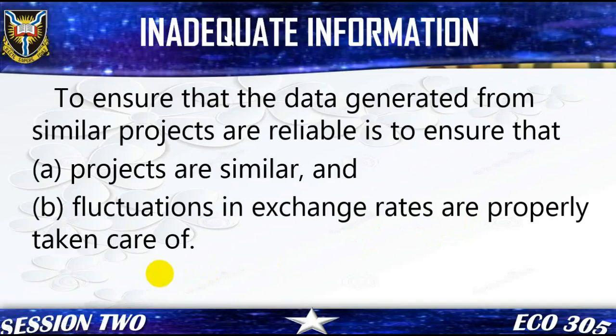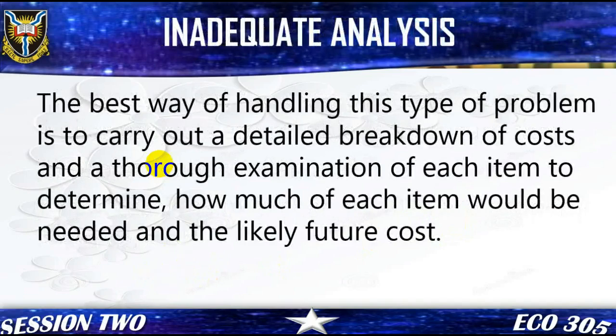3. Inadequate analysis. This may also result in project cost overrun. The best way of handling this type of problem is to carry out a detailed breakdown of costs and a thorough examination of each item to determine, where necessary, how much of such item would be needed and the likely future cost.